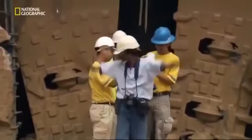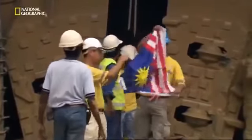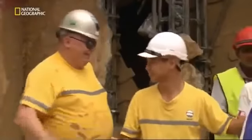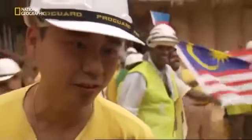For Senior Project Manager Gus Klados, it's been a rough but successful ride. To complete a 9-kilometer long tunnel, this large diameter tunnel in a city this close to the surface in more than difficult geological conditions, it's something, so it's good to be over. The workers Gus trained for the job are now experienced tunnelers. They've even broken a world speed record for their type of TBM, building 17 rings in a single day. It's a day they'll never forget. It's a very special feeling, beyond words.